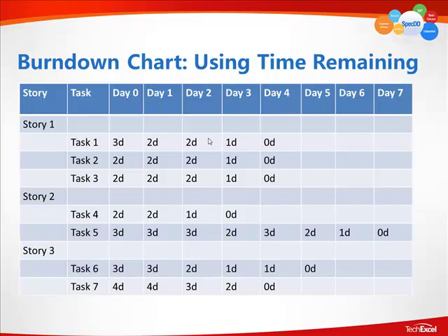So a Burndown chart is very useful even during a sprint. It's a great tool for reviewing a sprint once it's over to discuss the obstacles, the hurdles, why certain areas were stalled. But it is also a great tool during a sprint for the team to self-check themselves and to make sure that things are progressing smoothly. Now, this is using the time remaining. SpecDD really encourages for time remaining to be estimated, updated with the time remaining efforts every single day.